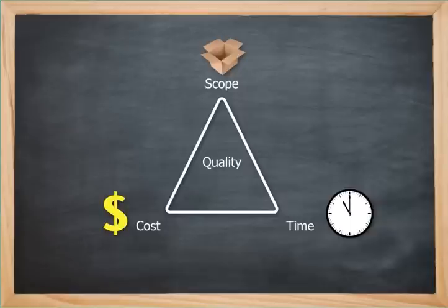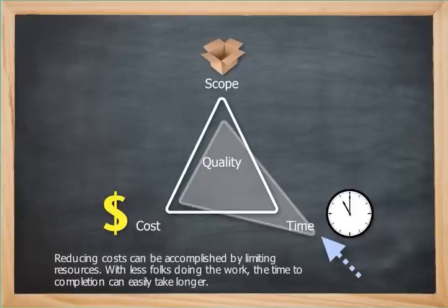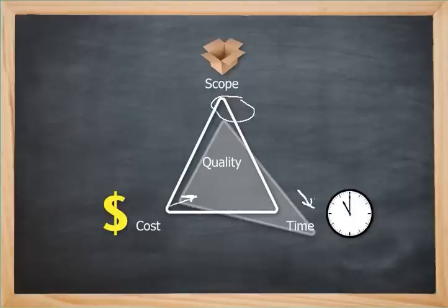Alright, now let's see what happens if you reduce time. See that gray area there? And what can happen as a result of that, cost may be less, but certainly the scope may be less too. So what you see here is if you reduce the schedule time, chances are you're not going to get all the features that you want done. And lastly, tightening the budget could increase the time and reduce the scope. If you have tightened the budget, it automatically has an impact on scope, and chances are the time gets extended too. So that's not necessarily a good thing to do.